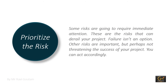The next step is to prioritize the risk. Some risks are going to require immediate action — not all risks are created equally. You need to evaluate the risk to know what resources you are going to assemble towards resolving it when and if it occurs. Some risks are going to be acceptable. Without first prioritizing the risk, having a large list of risks can be daunting. You can manage this by simply categorizing risks as high, medium, or low. With this perspective, you can plan for how and when you will address each risk.